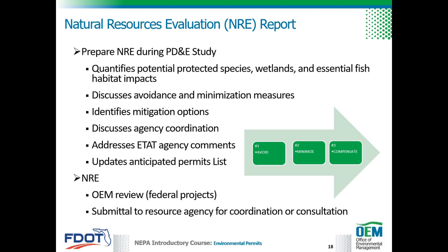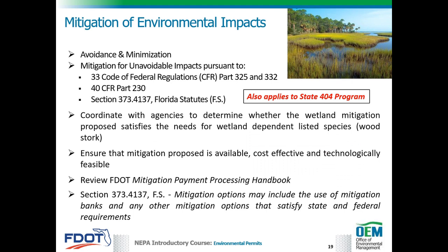Once OEM comments are addressed, the NRE is finalized and submitted to the applicable resource agency for coordination or consultation as appropriate. The NRE, as well as the environmental document, should include avoidance, minimization, and mitigation measures to demonstrate to the agencies that FDOT is working to address impacts.